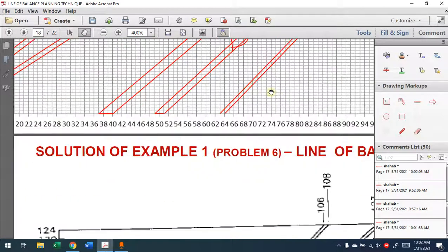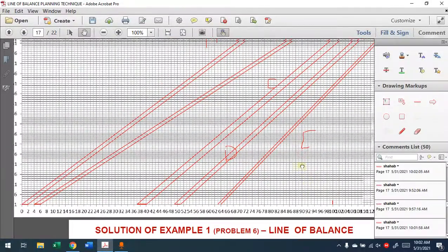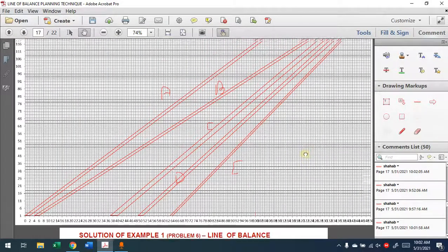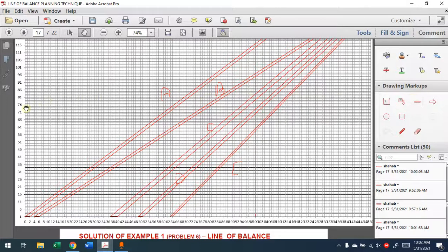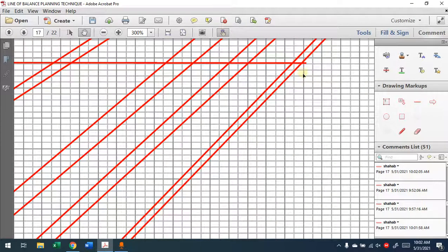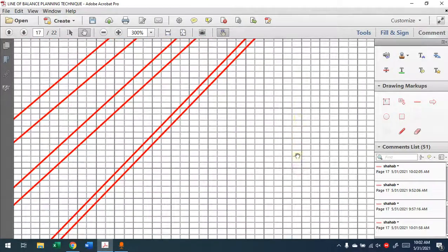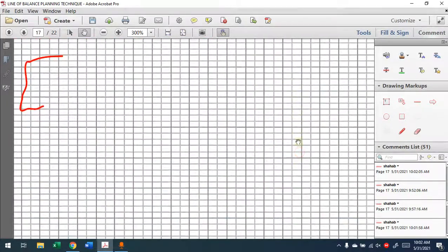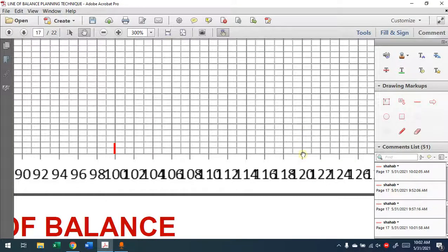But if you want to find any unit, for example, someone is asking you in how many days you will be able to finish, let's say 90 units. So where is 90? 90 will be somewhere here. This is 90. Whatever it is, the last point here, for example, this is the intersection. Look, the intersection to the last line. This will be the day, and when I go down, I'll say that by the day 120, I will finish 90 units. This is what it means.